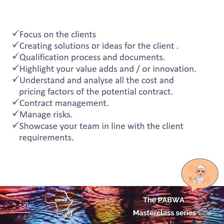You need to understand and analyze all the costs and pricing factors of this potential contract. A lot of clients will send you a document with the pricing schedule in it — yes, you have to fill out that document at the end, but you have to do the back-end work to calculate all the costs that go into this contract before you fill in the final numbers in the pricing schedule. That is very important. Then there's contract management — you need to demonstrate how you work effectively and how flexible you are in terms of changes and contract failures.